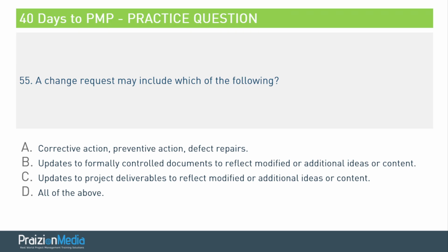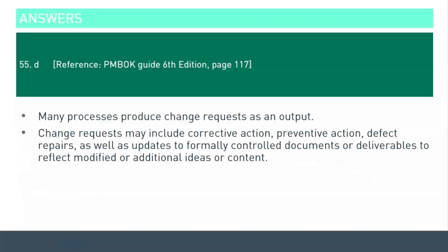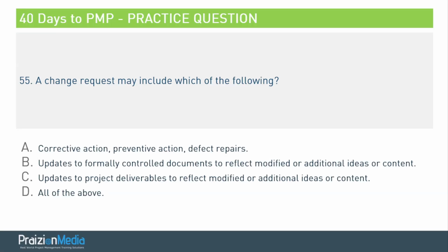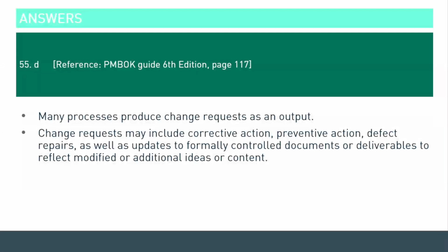All right, let's examine what the answer is. So the answer to this is D. The answer is all of the above because change requests include corrective actions, preventive actions, defect repair, and updates to documents, updates to deliverables. All right, let's move on to the next question.